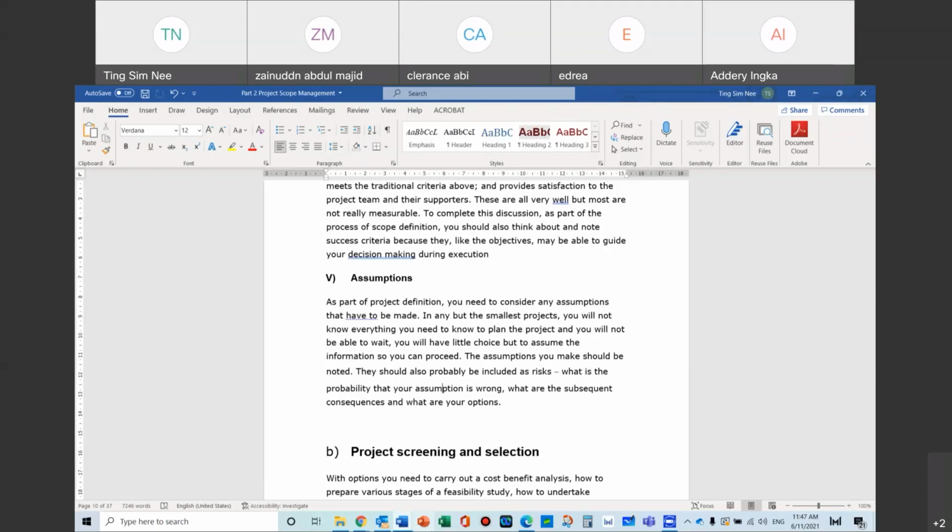Whereas if I talk about feasibility studies, it's more on economics. In feasibility studies, there are things that are measurable with money, dollars and cents, and things that are not measurable with dollars and cents. Like when we do cost benefit analysis, we look at how much it will cost. Technically, yes, it's about whether the thing is feasible, whether the design can overcome it. And then, of course, it will boil down to how much that particular design will cost and whether it's actually going to be able to solve the problem. So these are feasibility studies in terms of what can be measured in dollars and cents. And then we also do studies like social economics,